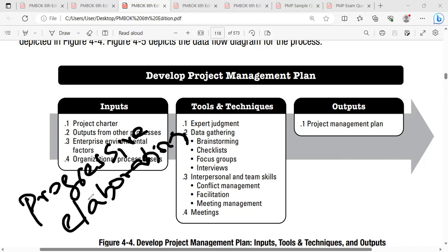and the project manager is going to bring a single master document and it's given to the execution, if the owner of that management plan wants to do any changes, then only you need to send a change request. I want to do a course correction. I want to change the strategy of the scope, how it will be managed. So I want to bring a new strategy. I want to omit the old strategy because the old strategy is so stringent, and the people are not comfortable. So if he has this kind of intention, he has to push a change request.